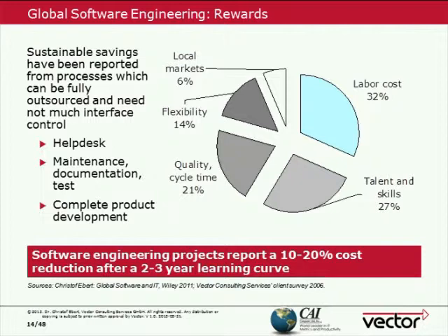This is far less than the labor difference, because the labor cost difference is compensated to a high degree by additional traveling, by additional communication overheads, by additional cost on collaboration, by sometimes a trade-off. I see that quite often, that companies tend to not scale up, for instance, their IT in order to be suitable for such global projects.